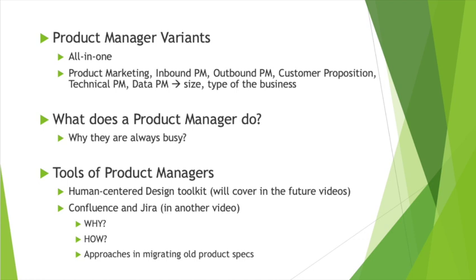Especially, as I mentioned in my case, because the developers are relatively inexperienced, there's a lot of work for the product manager to do to enrich it. That's why I prefer to prioritize it first, and then the product manager can start working on it. It goes back to maybe a loophole in the agile concept, or it's just missed out, which is how this kind of analysis and design time can fit into the 2 week sprint, because sometimes it takes much longer to get the requirements ready.